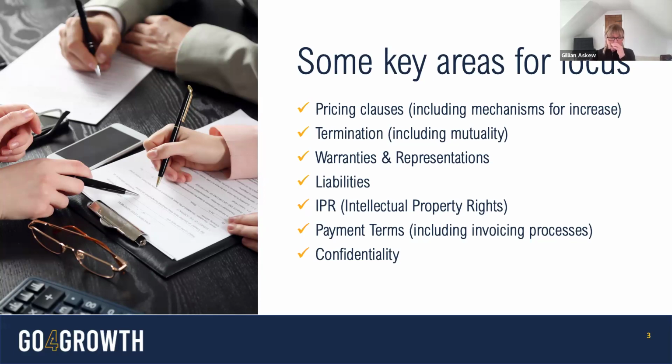If you disagree with the payment terms that are being laid out, you can again ask about that during the clarification process window. Normal terms would be 30 days from date of invoice. What I would say is lots of public sector organisations do have shorter payment terms at play. So there are constructs like early settlement discounts, which require you to give a discount if they pay you early. But actually, post-COVID, lots of public sector organisations have shorter payment terms specifically for small to medium enterprise organisations, recognising that cash flow is really important in an organisation.